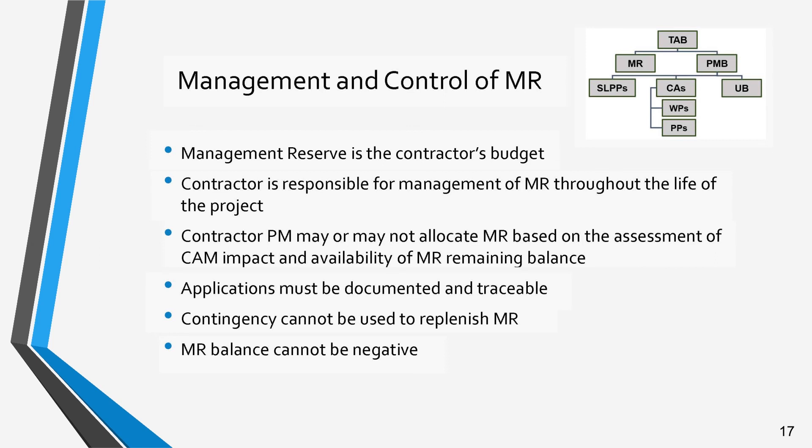It is important that MR be carefully controlled and monitored in formal records, such as the MR and CBB or PBB logs. These logs must be directly traceable to the IPMR with narrative explanations of MR use included in Format V. DOE contingency cannot be used to replenish MR. MR cannot be allocated beyond what exists — in other words, the balance cannot be negative.